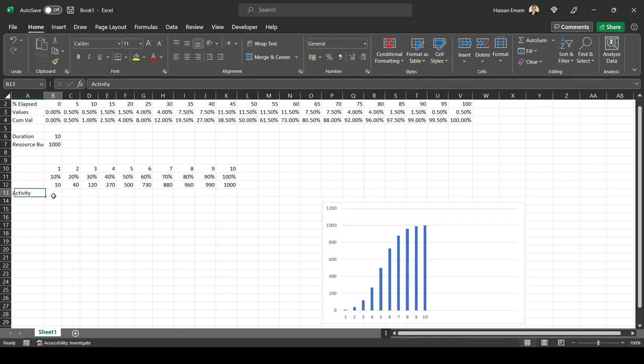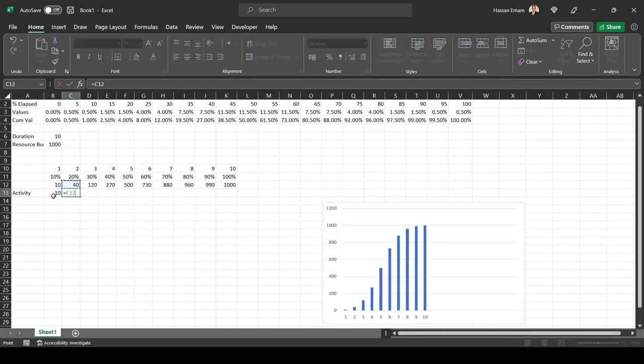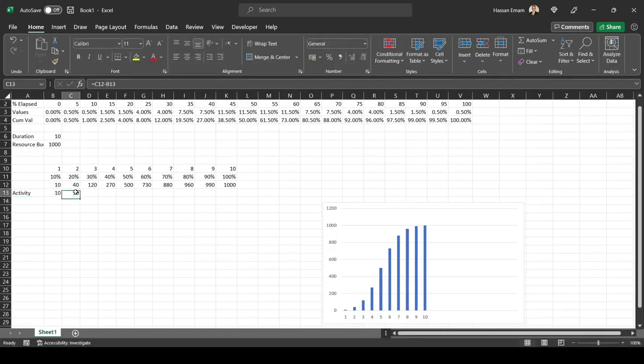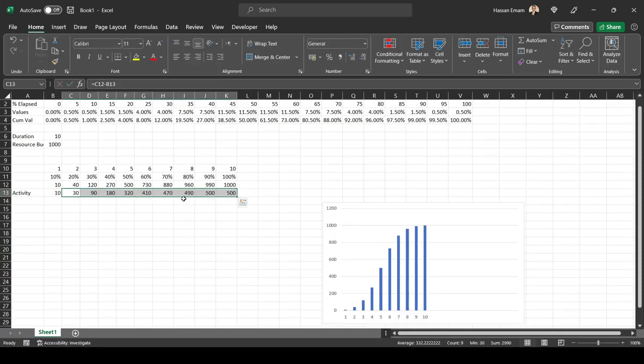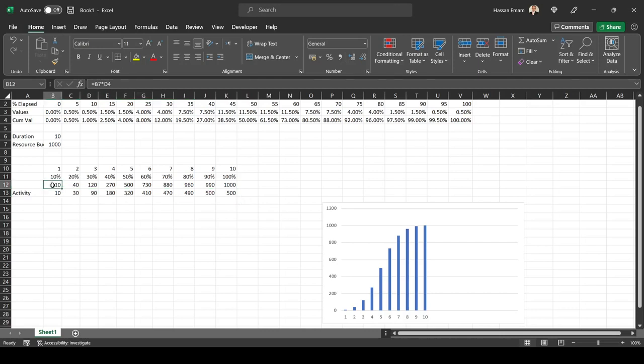You can see now our curve doesn't look anywhere near to the P6 because these are the cumulative distribution. The activity distribution would be the difference between the period and the previous period, and that should be our distribution.